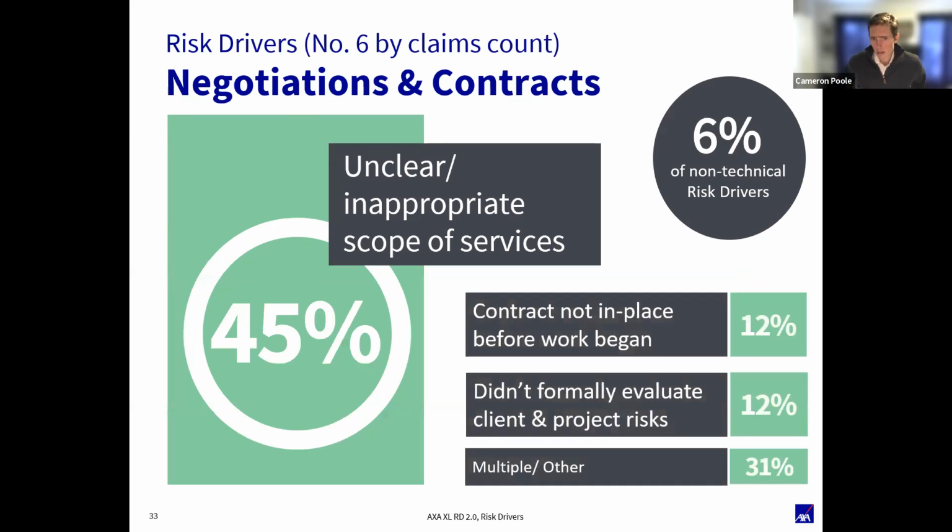Last one, contracts. We talked about this a few times. Things to hit on there. Standard of care, for me, that's a deal breaker. If they want to elevate the standard of care, that's not a client you want to work with. You should always be able to get that waiver of consequential damages, or almost always, right? If you're working on a really big project with a developer, maybe their attorneys aren't going to let you have it.